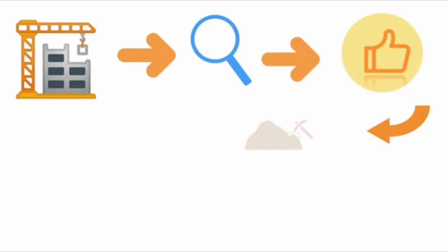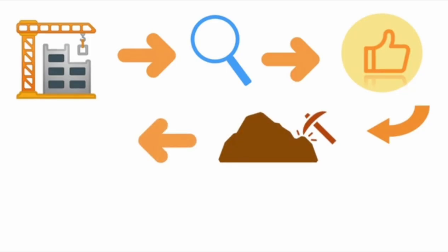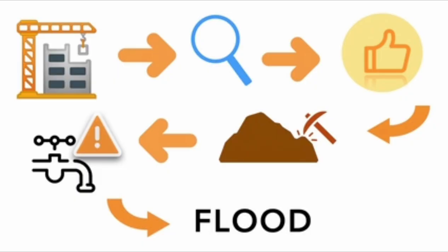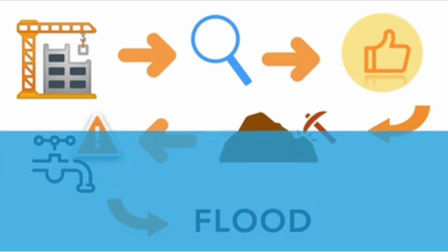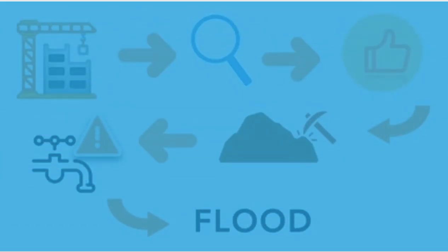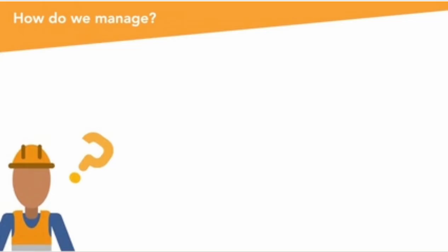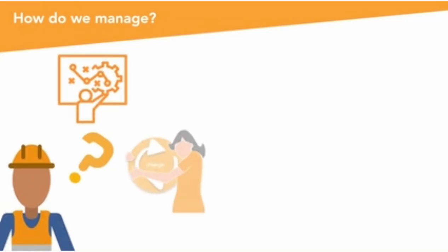But in the process of boring and digging, we ran into an aquifer or a water table, and suddenly the water table flooded the earthworks in the area where we are excavating, and suddenly, something that was not covered by the survey reared itself as, how do you manage these things, right? And so the plan has to be re-baselined while new execution has to happen, right?